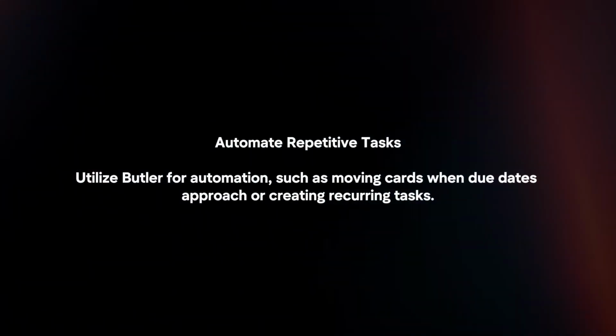Automate repetitive tasks. Utilize Butler for automation, such as moving cards when due dates approach or creating recurring tasks.